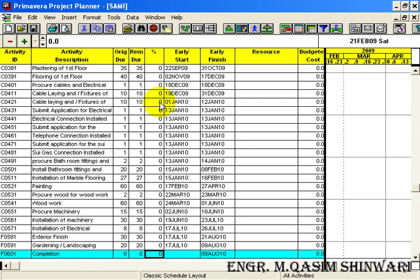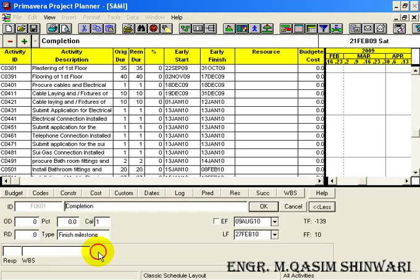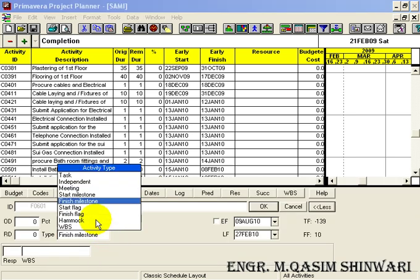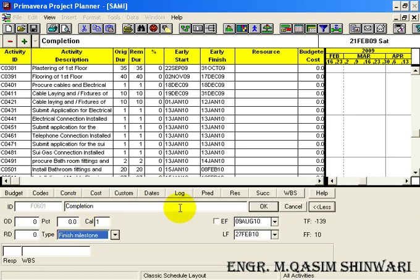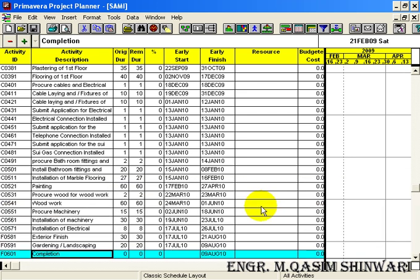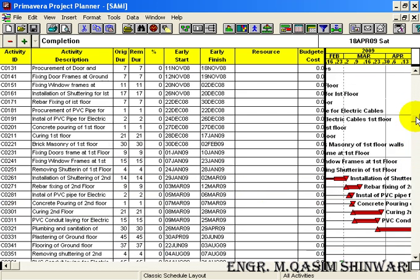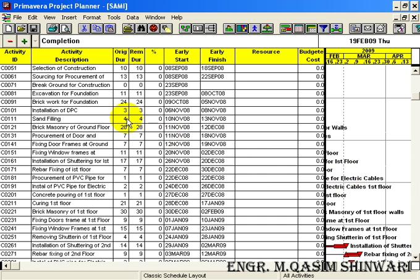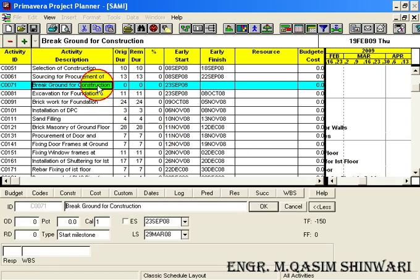And here we have another notation as F which stands for finishing phase. For the completion double click and select here Finish Milestone. And similarly one more is breakdown for construction.